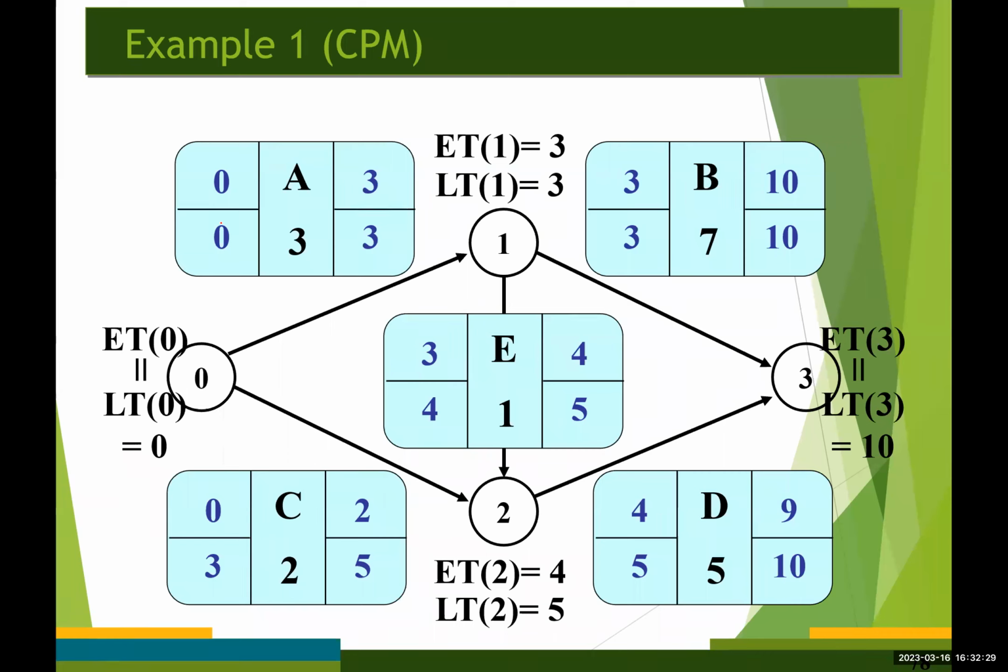It can be easily computed. It's simply the difference between the earliest start time and latest start time, or the difference between the earliest finish time and latest finish time.